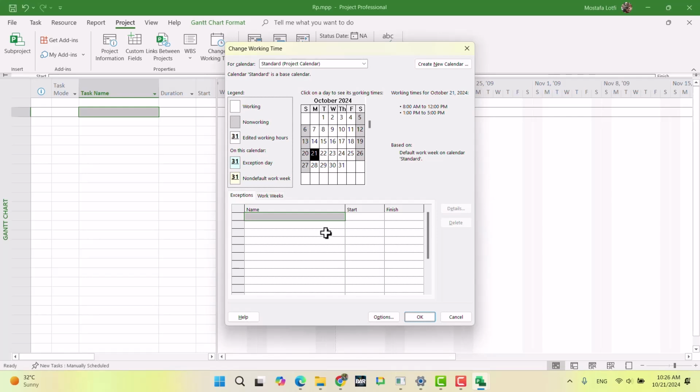So if I want to select one calendar for the whole project that covers all these cities and all the scope of work, then the calendar should be 7 days. In other words, in my project, each day there is something to do based on the location. Okay, that's what it means.